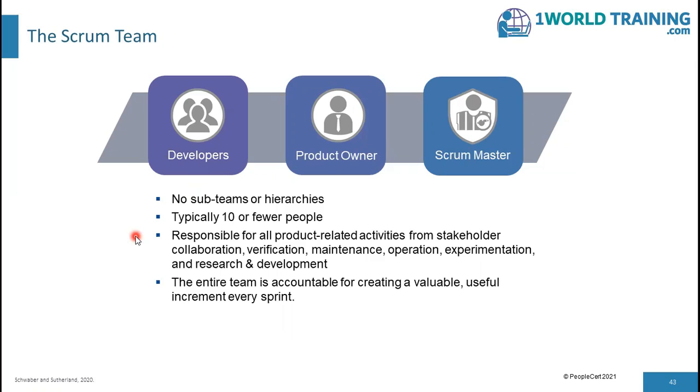The Scrum team is kept small enough in order to remain nimble and large enough to complete significant work within a sprint, typically therefore 10 or fewer people. In general, it has been found that smaller teams communicate better and are more productive. If Scrum teams become too large, they should consider reorganizing into multiple cohesive Scrum teams, each focused on the same product. Therefore, they should share the same product goal, same product backlog, and product owner.